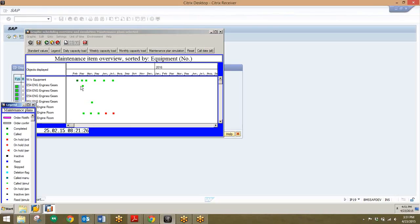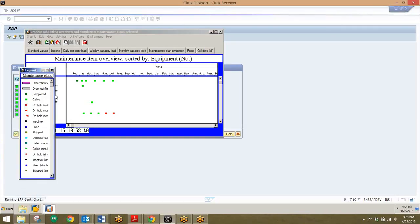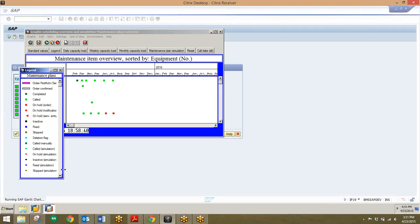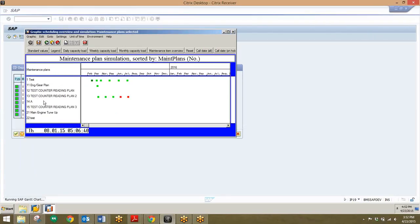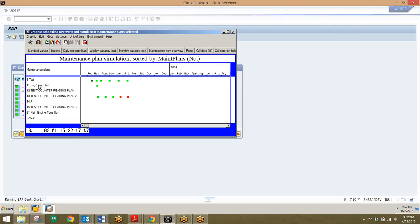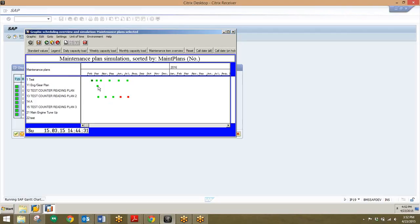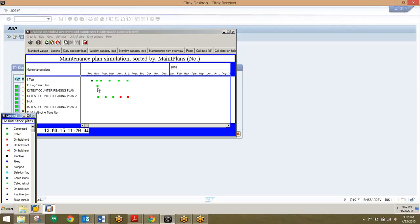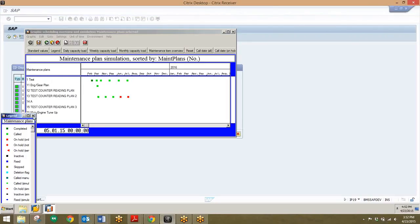We can open up the legend here to see what these different icons mean. We can see that in February there was one that was completed, and then we have about 10 others that are called. And then in June and July we have two orders that are currently on hold as indicated by the red square right there. In addition, we can click on this maintenance plan simulation to take a look at what these plans pertain to. We can see that this engine/gear plan only has one plan that's been called, and that was in March. We can do that with any of these other maintenance plans as well. This is nice just because it lays it out in a Gantt chart type graph.